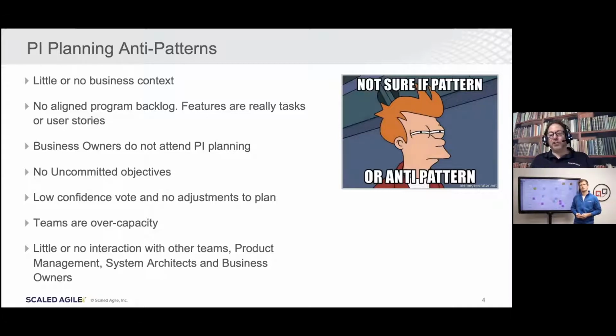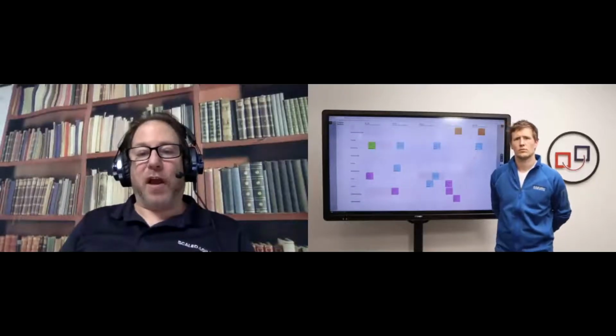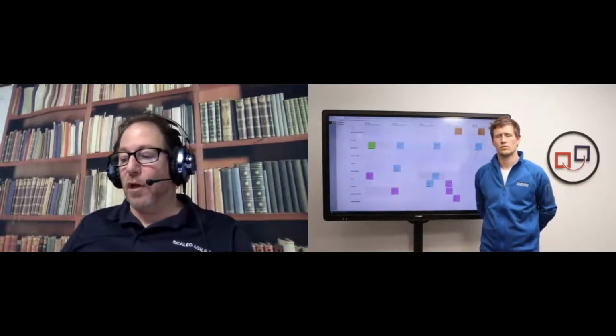And some conversations take longer. There is more preparation in terms of, for example, how we are going to discuss some of the features that still have some uncertainty about them, and we want to get better alignment about what we're delivering with that feature, whether from a business perspective or how we're going to implement it from a technical perspective. What we also found was that we needed to plan some meetings in advance, some things that we already knew we had to speak about. The RTE and the Scrum Masters worked together to schedule some meetings in advance, as well as how we were going to do some ad hoc meetings that we hadn't planned for. So we also did that.